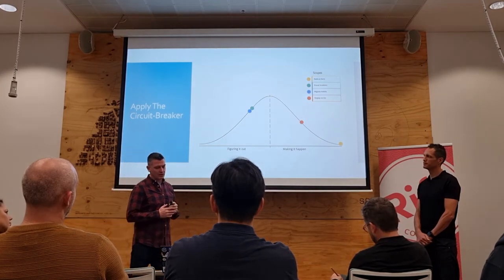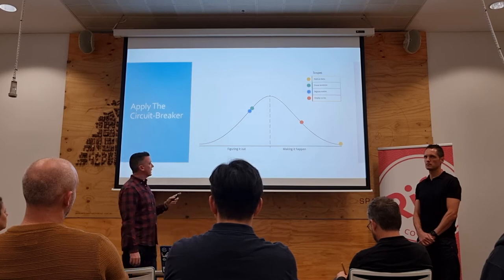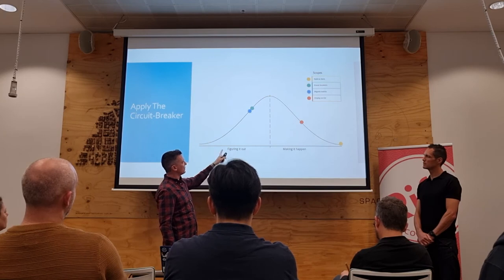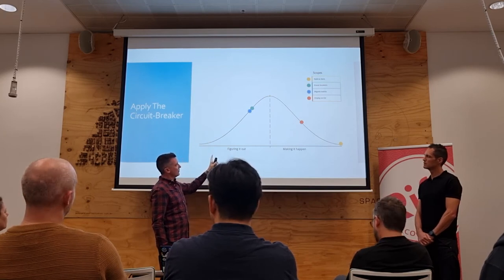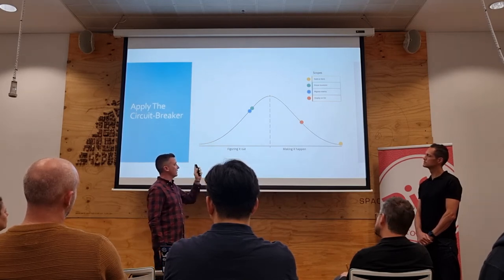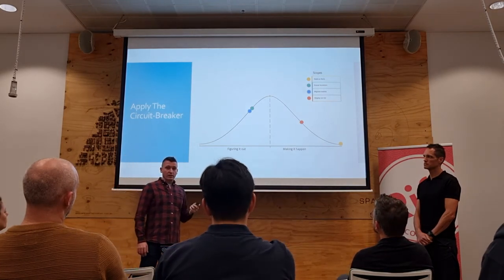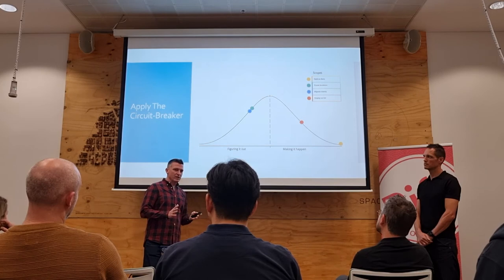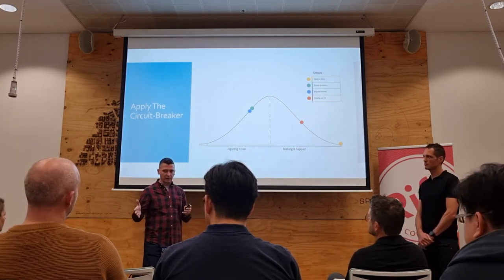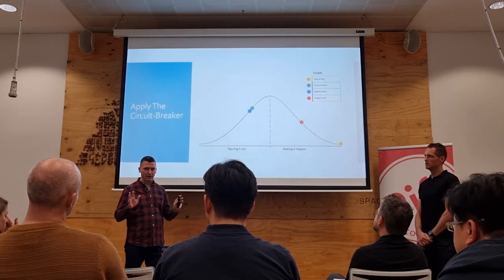Circuit breaker. So this one's a bit different. Let's say we didn't apply the handbrake and we decided to continue the project. We made a little bit of progress, and we've got display on this over the hill. That was pretty straightforward. And migrate events is coming along. There's a dependency on migrate events with preset locations. We just don't seem to get those over the hill. The engineers come to us and say, I think we just need about another week or two, can we work into our cool down period? So this is after the 6 week cycle, we have our cool down period. And we're pretty confident we're going to get it.